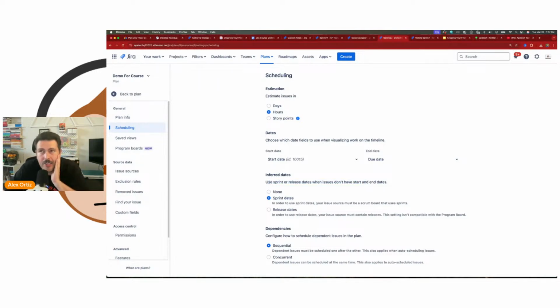It's going to infer, technically the right word. I'm trying to find a different word for inferred, because I think it's a hard word in English. Jira will know pre-existing the dates that you should have based on either nothing, so don't put any dates on it prematurely, inherit whatever's in the sprint, or inherit whatever's in your release. So these are your options here.